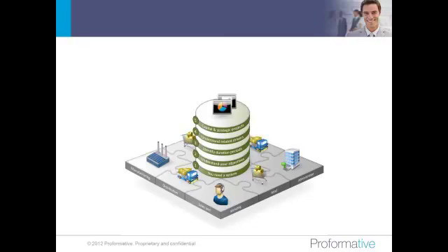And so by having them separate from the rolling plan, you have the agility to just change the start and end date and see what is the impact to the overall bottom line very quickly. So you really want to treat them as a separate entity or profit center. Okay, think about it like that. And then have the ability to move them in and out of the rolling forecast completely or just shift them in time. And then in addition, they should have the ability to just change or adjust for scope, not just time frame.